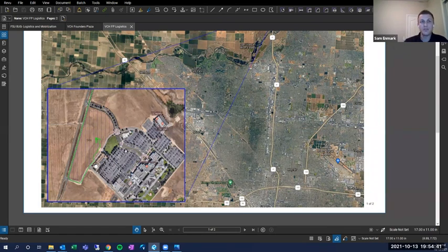So we talked with Valley Children's about what their current ambulance path of travel is, and we're doing our best to avoid that. What will have to happen is we will have to make a tie-in in this street, so our site utilities tie in here. So that's something that we're currently coordinating with Valley Children's, like, hey, when we make this tie-in and we tear up this road, what are your ambulances going to have to do? Right, so that's kind of just another step to this logistics. Like Carrie was saying, this is our ideal logistics, but we're going to have 2 weeks where we have to flip that on its head as we're tying in utilities.